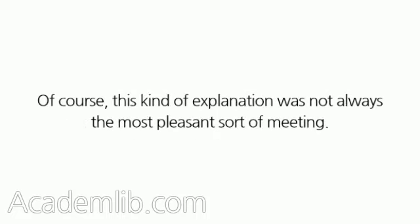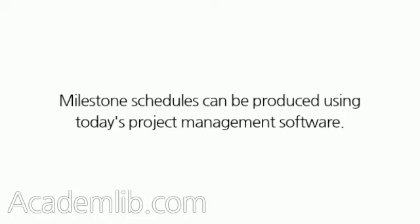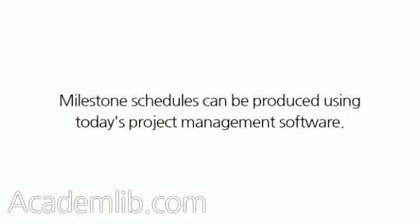Of course, this kind of explanation was not always the most pleasant sort of meeting. Milestone schedules can be produced using today's project management software. They are created simply by listing the milestones as activities and giving them a duration of zero.